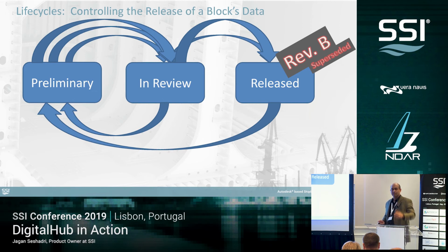You have to start an engineering change order. And so now you have to kick out of the released state back to preliminary. You still have a bunch of deliverables that have been issued at Rev A. What the system now tells you is that, yes, those have been issued. Those are still out in the wild. But we've marked that as in change. In other words, a change is coming. Whether you want to hold off on work or proceed at risk, it's up to you. But we're trying to communicate that a change is coming.